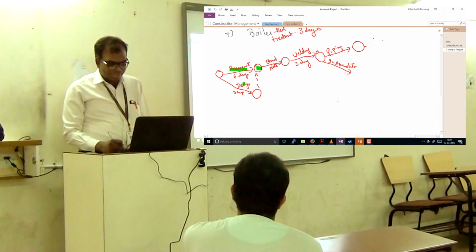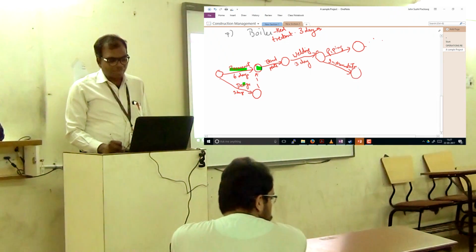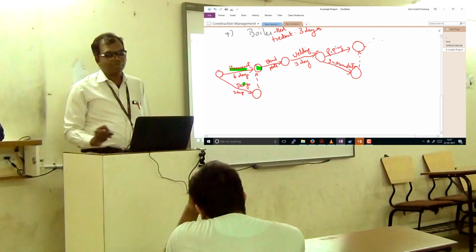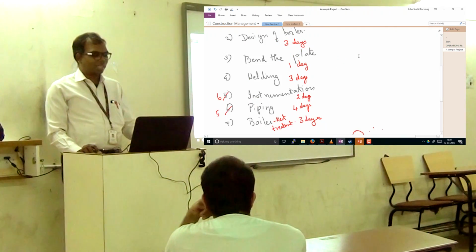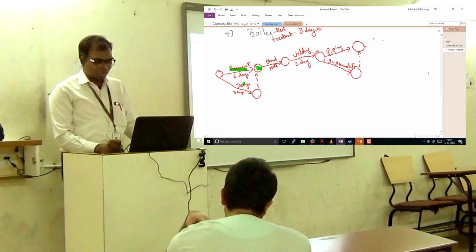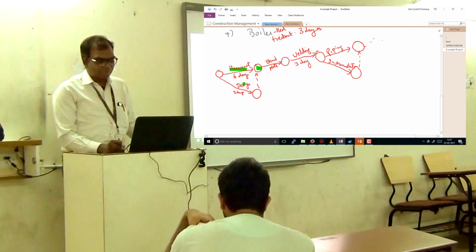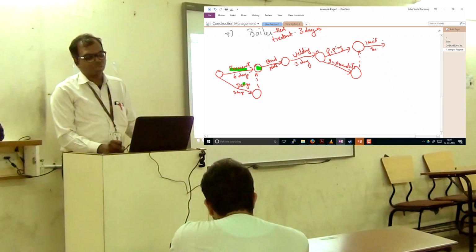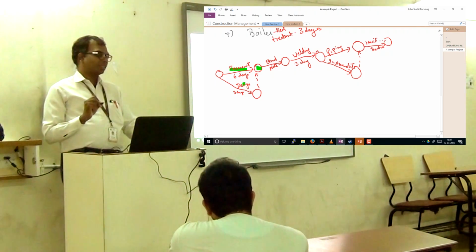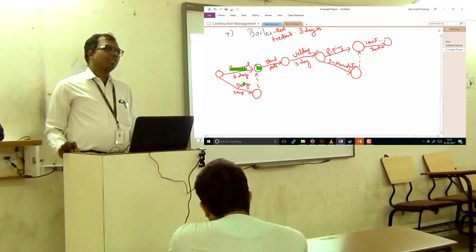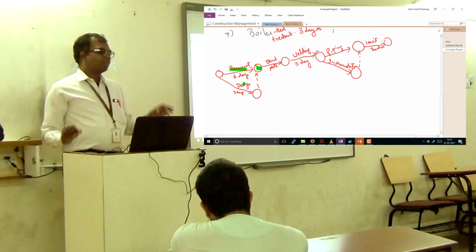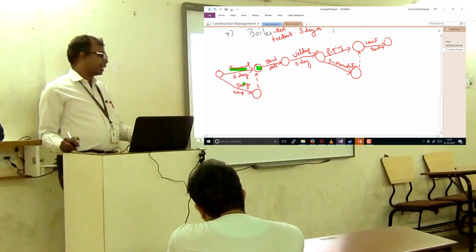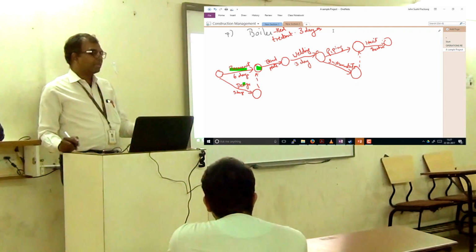But in any case, here again I come to a situation where I need to keep the flow right. I cannot do the heat treatment till I finish the whole thing, I presume. So I keep it and then say heat treatment or testing, whatever you want to put, right here, and then the project finishes here. So here the problem is you need to choose dummy activities.